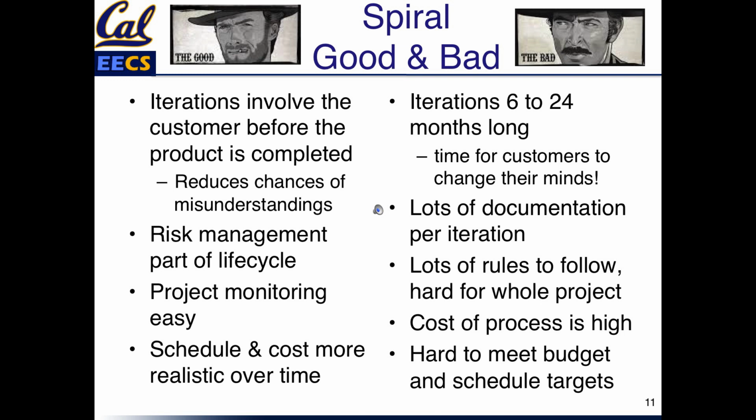It's easier to monitor the project than Waterfall, which goes through these separate phases. You're going around, you kind of see where you are in the second or third iteration. And your schedule and cost projections get more realistic over time. You're more familiar with it. The customer's seen it. You get an idea where you're closer to the end.